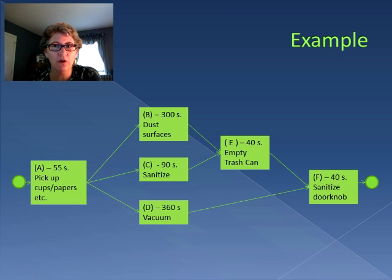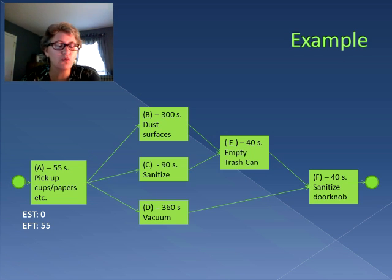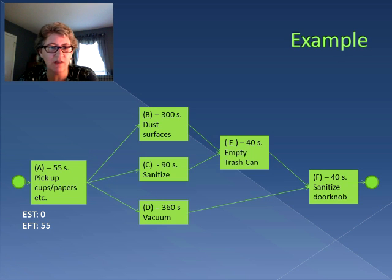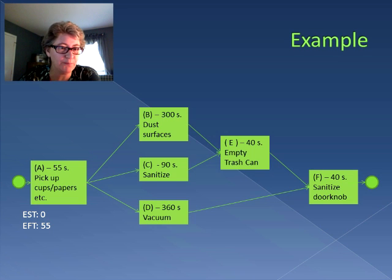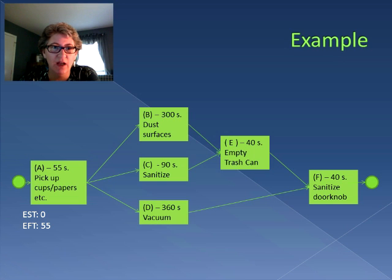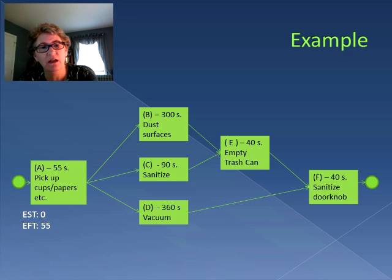We're going to take a forward pass through the flow diagram starting with Activity A. It starts right at time zero — it's the first activity in the entire process. So at time zero that's when the activity can start, and then we add the 55 seconds that the activity lasts, so we know that it can finish at time 55.